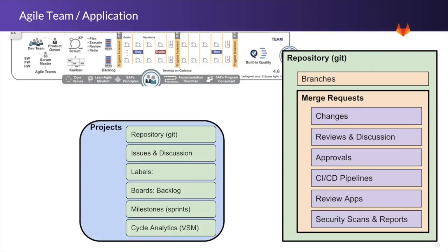You can create that PI objective board and start assigning issues to sprints, or doing our sprint planning, taking it from the product backlog, moving it to the appropriate sprint, and then doing that assignment of issues to that sprint. If you have a self-organizing team, they can pull those issues off and assign them to themselves, or if you're an organization that has a Scrum master or a product manager doing the assigning, they can do that as well.